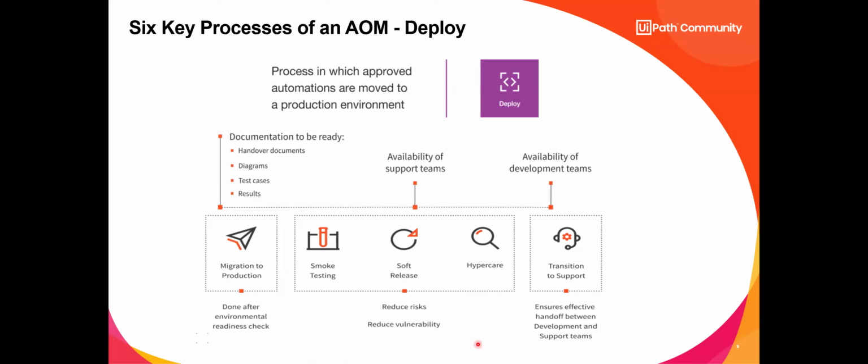We have a lot of documentation we're giving off here. We're giving off the run book. Run book should be a very detailed technical document. You don't need to use a technical writer, but it should be a very detailed user guide. It's just a user manual. This is what your automation is doing, and it should have pretty pictures, diagrams, test cases, and the results of all that. You don't own any of that. That's all owned by the organization or the client if you're building for a client.